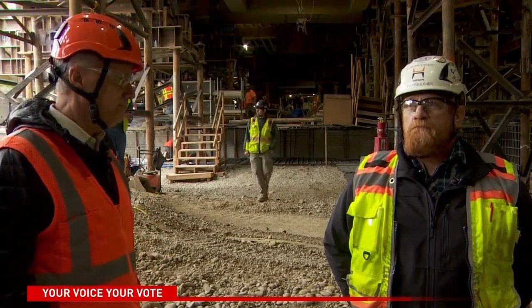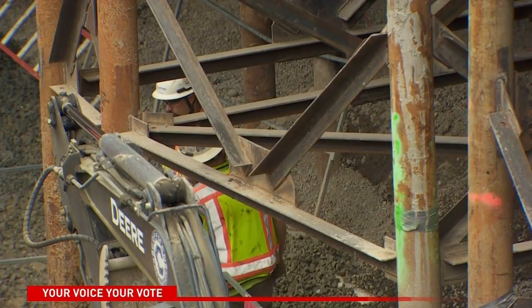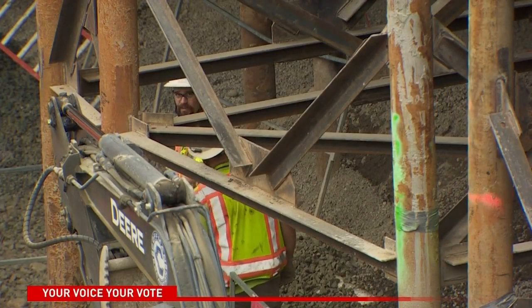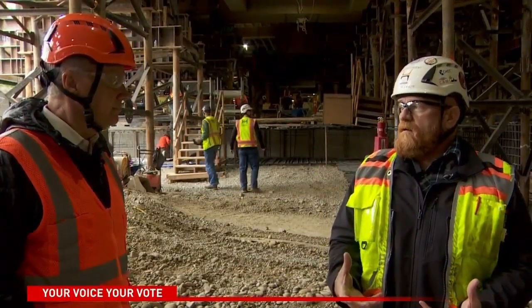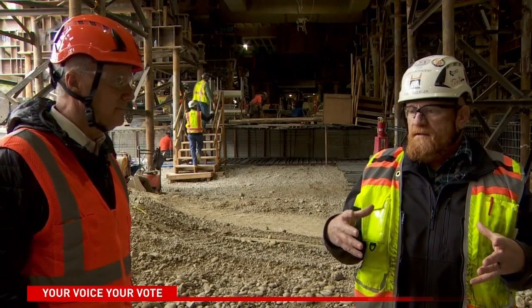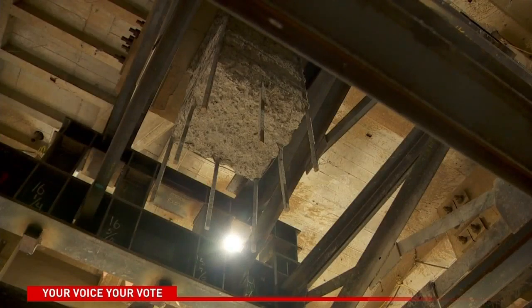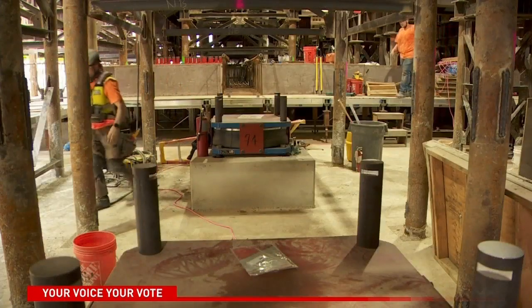Well, we are holding up the state capitol, and it hasn't moved any more than 1/8 of an inch, and that's been on these stilts for over a year. And then how do you build a foundation of a building that already exists, especially one as heavy as this? We've had to figure out how to hold all of the marble in place, make sure that it stays, because you didn't want to skin the entire building, take all that weight off to have to put it all back on. So everything that's been engineered right now is the entire weight of this building. So it's pretty innovative, and to do it so that when you put it back together, it's going to withstand a massive earthquake. Would you say so far that things are going according to plan?